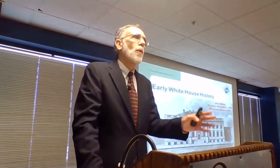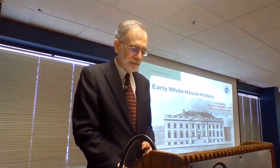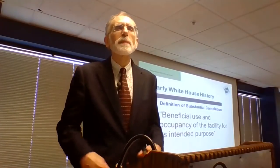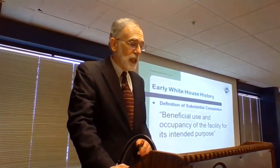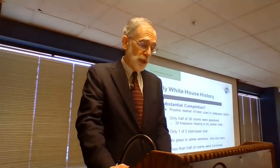So for 60 years, the White House stood as the largest building in the United States. So the question comes up, when Adams moved into the White House, was the building substantially complete? When we're dealing with a construction project, we have a definition of substantial completion, and that is, does the owner have beneficial use and occupancy of the facility for its intended purpose? So was the White House substantially complete? Well, let's take a look at some of the information.